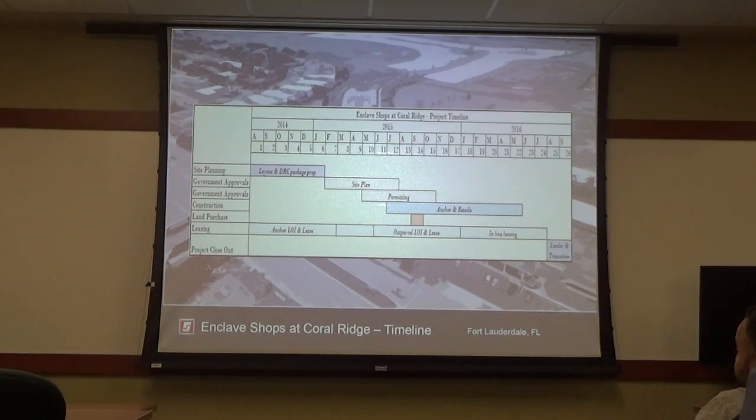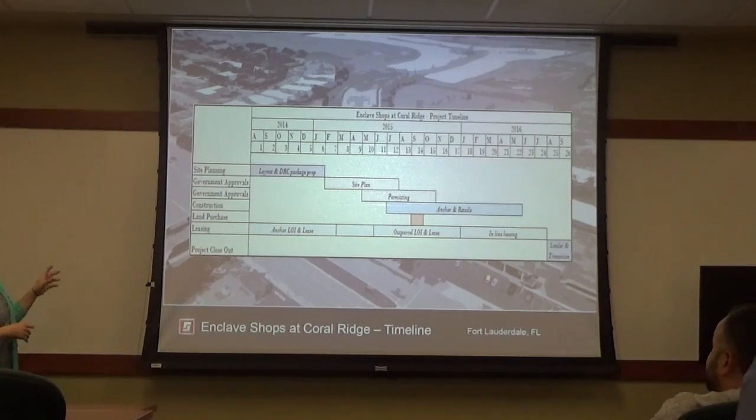And they said, okay, well, you can get an early start permit. So while the building permit's getting reviewed, we submitted for that. We submitted some underground plumbing plans, our foundation plans, site work, all that. So that allowed us to work for up to about 2 weeks. So then when that was over, to preface this, we never did any work that we weren't permitted to do, but this was a real challenge on this project.